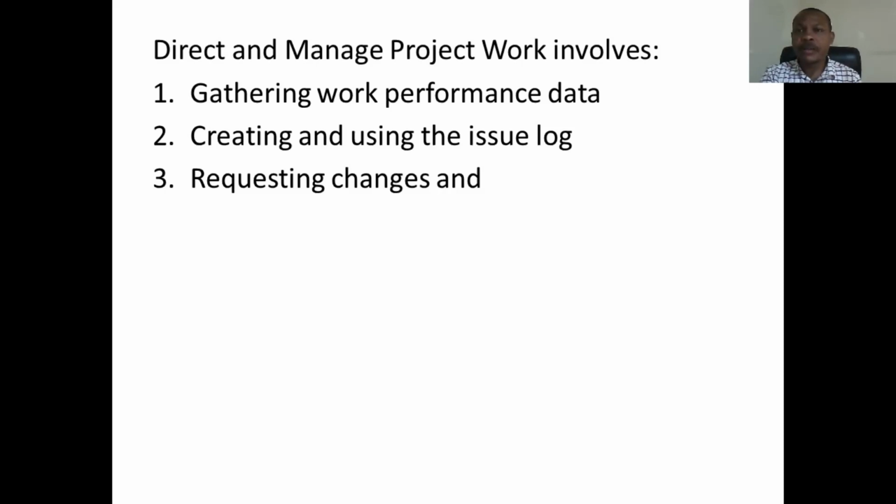So for you to make any change, there's a need to raise a change request. A change request can be raised by the project manager. Maybe you feel something is not right with the project and you want to suggest a change, and it could be raised by the project owner, it could be raised by any stakeholder at all. But then there is a process. The process is this: you have to raise a change request, and right in the change request, you're going to tell them the change and the need for this change.